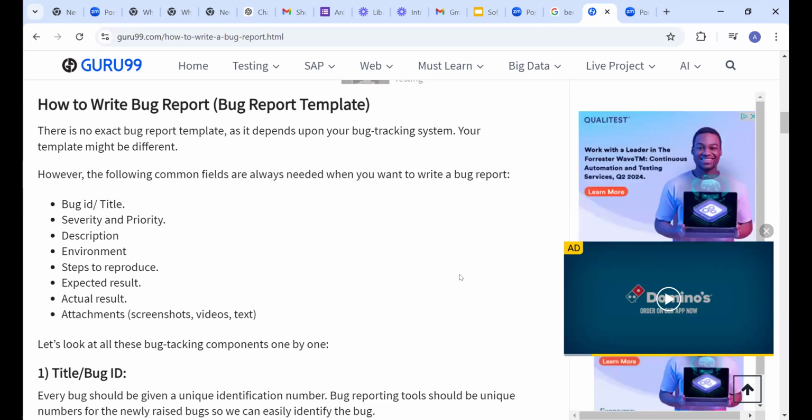But major things, like you're not able to carry out a transaction, you're not able to log in, you're not able to sign up, those are major defects that have high severity and also high priority. So you need to ensure that the developer fixes those.